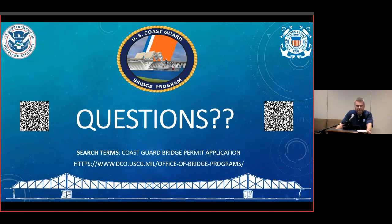Okay, we have another question, comes in anonymously. In Florida, we use state and water district permitting for wetlands and state 404 permits. Would you recommend including those as well in the application? Go ahead, Jamie. Yeah, we just worked a couple of permits, or are in the process of working some permits in Florida, and noticed that the water quality certificate has been agreed to be covered through the state's environmental resources permit, which, so long as we can follow the bouncing ball of who has what delegation, we will accept that.